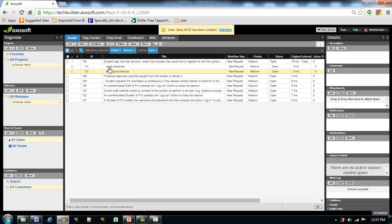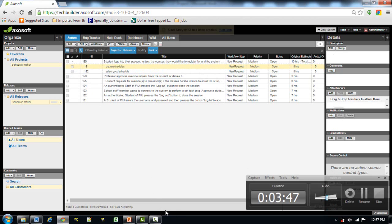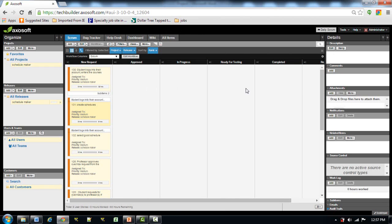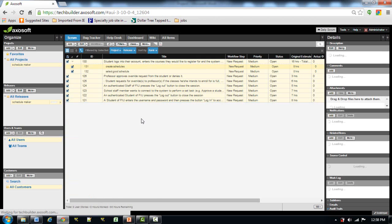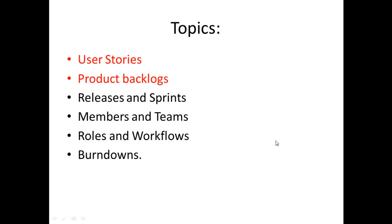The subtask doesn't necessarily need to be the same as the user story — it can be related to the developer's technical tasks. The collection of these user stories is called the product backlog. Now that it is quite populated, we can also view it in the card view. We are done creating the user stories and product backlog.